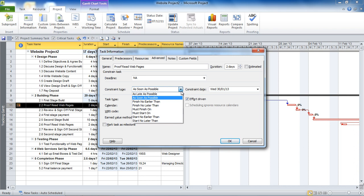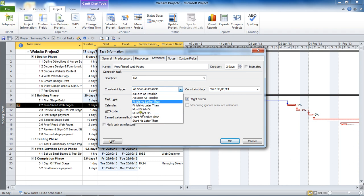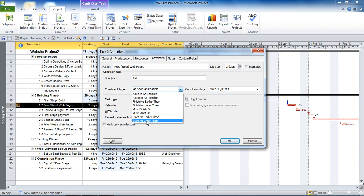But you see there are six others there, from finish no earlier than all the way down to start no later than. Must finish and must start are inflexible constraints. And we've got four semi-flexible ones. But they're all different types of constraints where you can constrain over the start or finish date. And they're there for you to use if that's the case. It's just to consider for a little while whether it is the right thing to do, whether it's the best thing to do for your project.